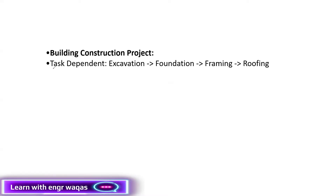Whenever we develop any activity in Primavera P6, it will be task dependent by default. In job interviews, they are going to ask you: if you are working in Primavera P6, what kind of relationship is there by default? Finish to start. And what kind of activity will be developed by default? Task dependent.